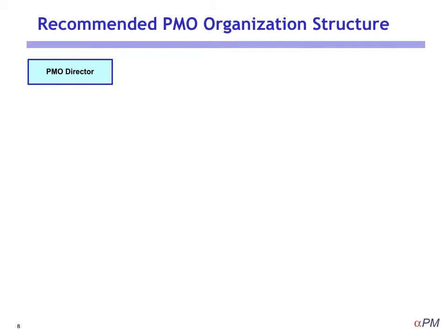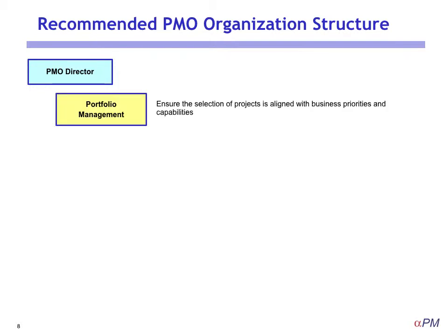You definitely need to assign someone who will act in this PMO director role, and it should be one of your most senior and most experienced project managers. And again, here we're talking about at this point a virtual PMO. So throughout the rest of this presentation, you can assume I'm talking about a virtual PMO. These are staffed with maybe 5 to 7 people, as I say, from your project managers who are the most experienced and the most successful, and they've committed to giving 1 to 2 days per week for the duration of their stay within this virtual PMO.